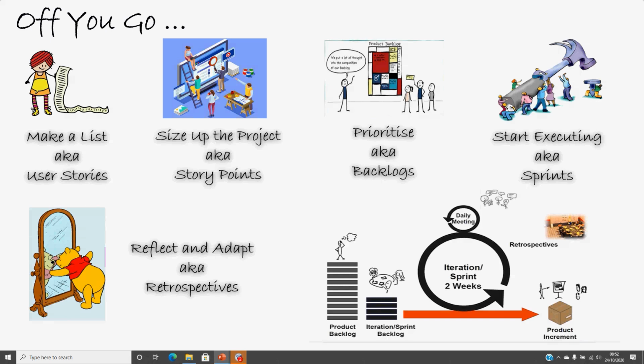You start executing those sprints, and at the end of the sprint, you sit together with the team and do a sprint review. Once the sprint review is done, you do a retrospective review, in which we have just discussed that idea. You're going through the behaviors, the logistics, the framework, what went well and what did not go that well.